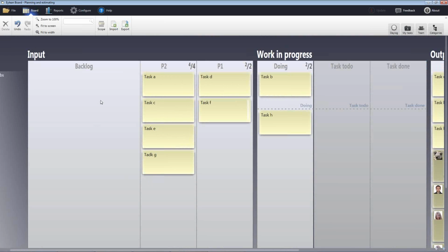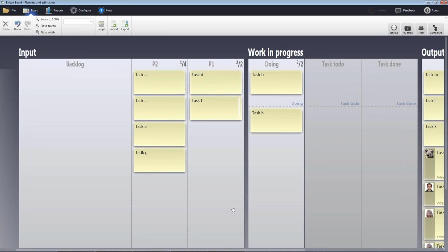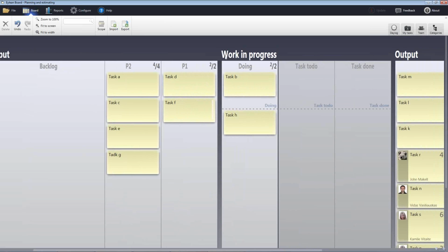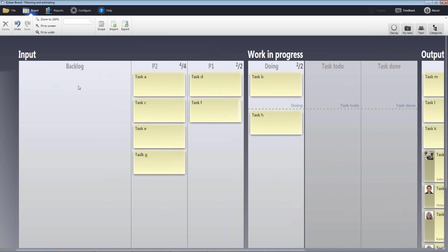And still, we avoid the risk of having the team stall, working on nothing, because they still have a buffer, P1, which consists of a minimum of tasks equal to the pipeline stream, and there is the priority 2 backlog buffer, which consists of twice as many tasks. So we're all set, and we don't need to worry about rushing the same second we see the empty backlog. It can take up to 1 day.